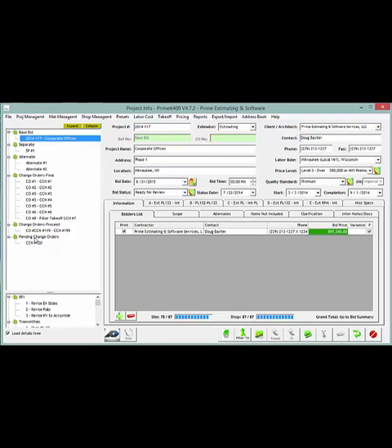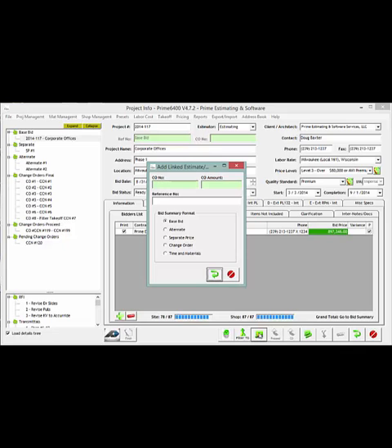Those are tiered between pending change orders with a proceed, maybe a written proceed but no formal change order, and then of course with a final change order for implementation up on top here. So virtually you want to start out with a pending change order. We would come down here to our linked estimate, and from this window we're going to select whether it is base bid, separate prices, alternate prices by the appropriate boxes.